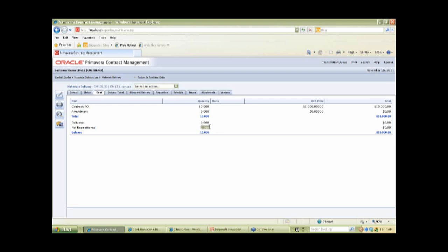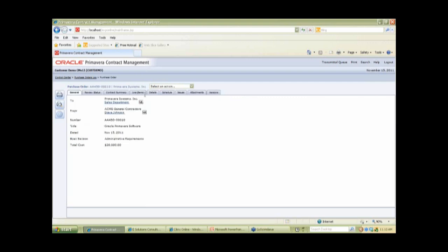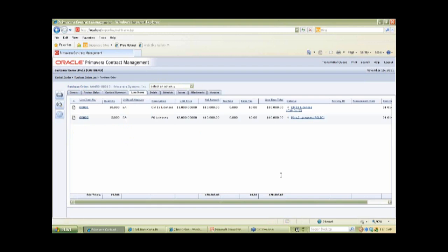And then when things have been requisitioned or when they have been billed on a requisition, that would also be recorded here so that you can track your total amount of what you contracted or requested by a purchase order, and then what's been delivered, and then what's been billed, and your balance that's remaining, so that you can always track what's going on with your stored materials on your project. All right? And you would establish those hyperlinks at the contract or the purchase order level. Okay?